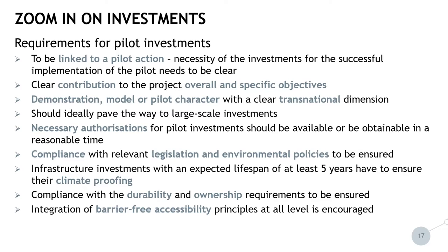The necessary authorizations for pilot investments should already be available or obtainable in a reasonable time, given that project time is limited. Compliance with relevant legislation and environmental policies must be ensured, and infrastructure investments with an expected lifespan of at least five years must ensure climate proofing. Compliance with durability and ownership requirements must be ensured, and in terms of horizontal principles, the integration of barrier-free accessibility principles at all levels is highly encouraged by the program.